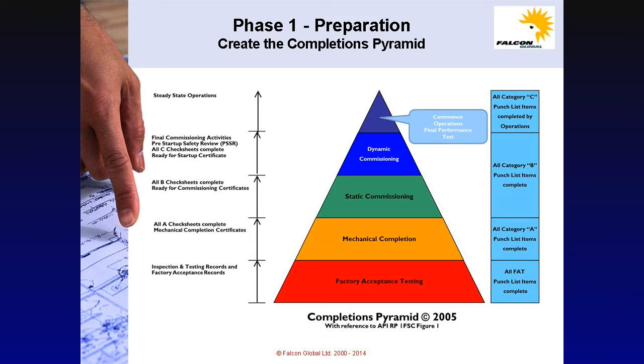the completion of dynamic commissioning. In startup and performance testing, this will include all of the PSSRs and the relevant certification to denote the completion of this phase until final acceptance of the facility.